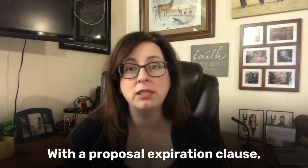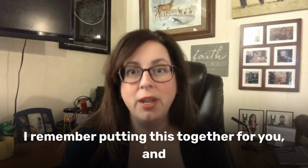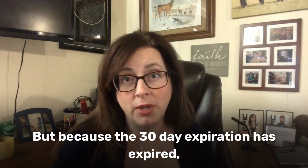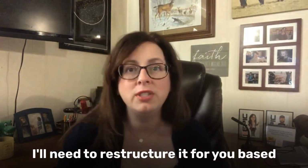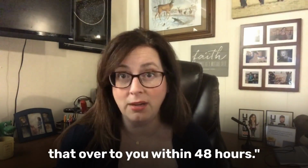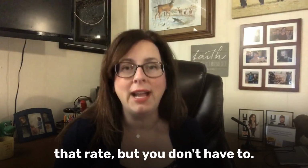With a proposal expiration clause, you can simply say, "Great, I remember putting this together for you and I'm super excited to get started again. But because the 30-day expiration has expired, I'll need to restructure it for you based on my current rates, and I'll get that over to you within 48 hours." Of course, you can choose to honor that rate, but you don't have to.